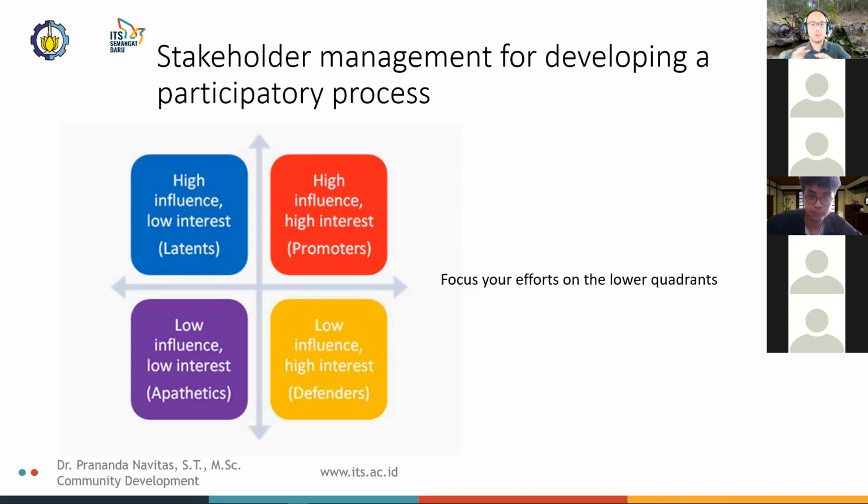Important message: the task of converting the negative or skeptical still exists in this situation, as does the need to create interest among the latents, these guys. Those stakeholders who could be helpful but don't have a strong investment in the effort. Often the stories of those who have or will benefit from the effort can be effective motivators for people who might otherwise be indifferent. Such stories are particularly powerful if the listeners know the people involved but never suspected the difficulties they will face. If the latents become involved, their influence can help to greatly strengthen the effort.